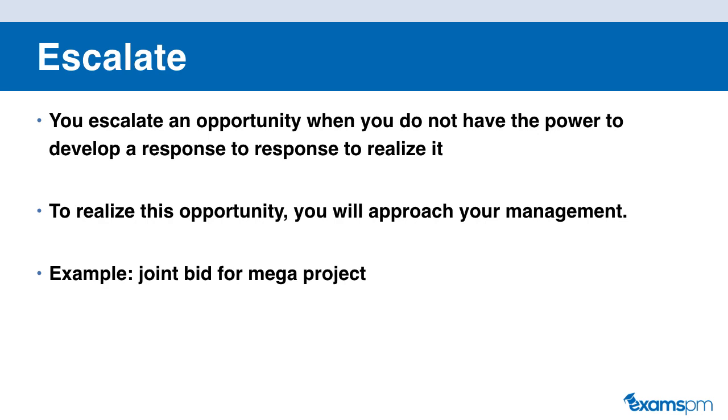This is an example of the escalate risk response strategy, because here you don't have the authority or the communication channel to speak to the head of the other organization to negotiate and seal the deal. Therefore, you escalate the issue to your management and they will take care of it.